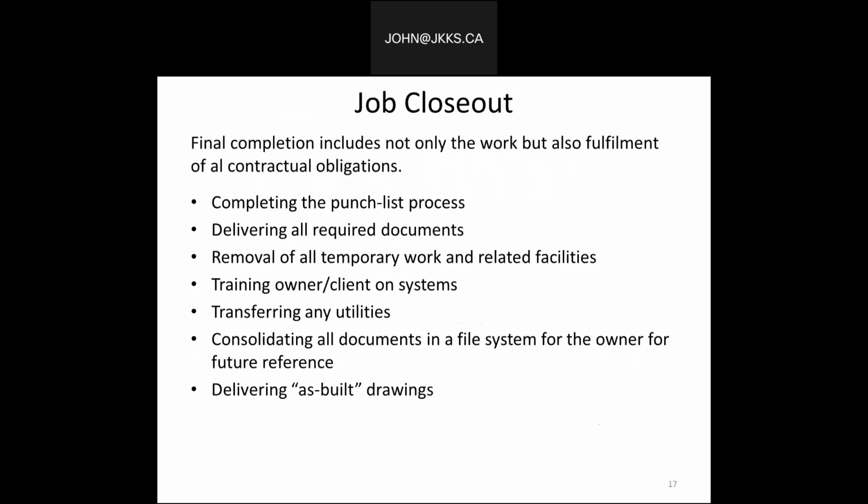So if we take a look at some of those obligations: completing the punch list process, completing all those deficiencies, delivering all those required documents, removal of all temporary work and related facilities, training the owner, the clients on the various systems in the building, transferring any utilities such as utility bills and so on, consolidating all documents in a file system for the owner for future reference, and delivering as-built drawings.